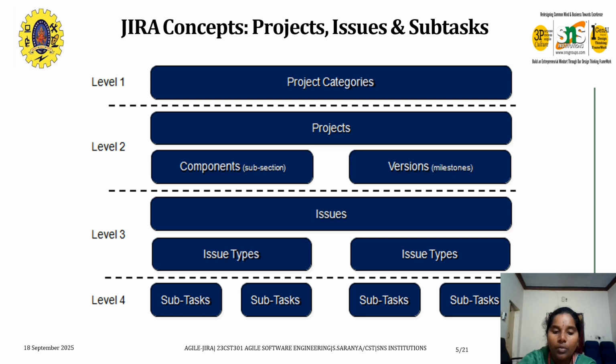And the sequence of events of Kanban is a continuous flow. Scrum is regular, fixed-length sprints as the sequence of events, where the project is divided into weeks. The practices of Kanban are visualize workflow, limit work in progress, control flow, and incorporate feedback loops.